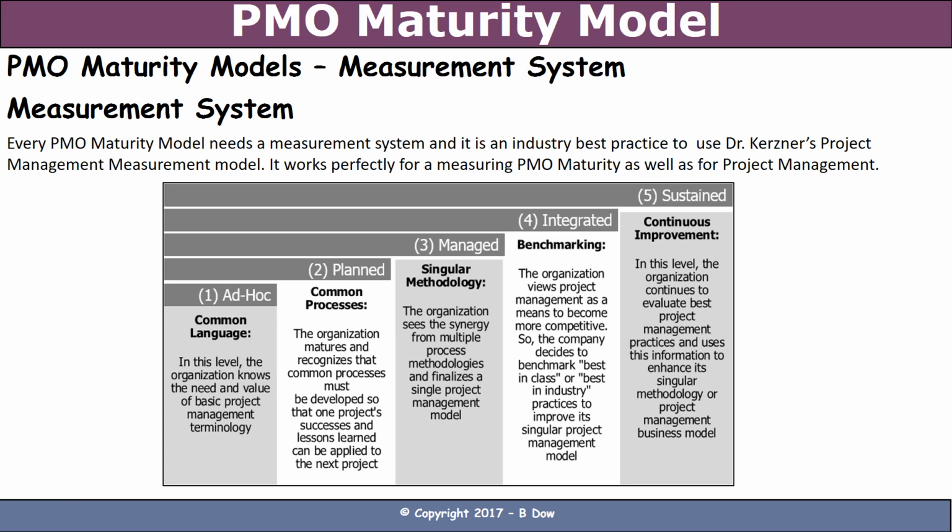When you think about a measurement system, you're really thinking about what is the process, or how are we going to measure how well we're doing, right? What I strongly suggest is to use Dr. Kerzner's project management measurement model. Now you're saying, hey, project management, but this is a PMO. Trust me, it works. You've got 5 scales here: ad hoc, planned, managed, integrated, and sustained, right? Common language, common process, single methodology, benchmarking, continuous improvement. Now that works perfectly for project management, of course, because Dr. Kerzner created it, and it is the model that everyone uses.